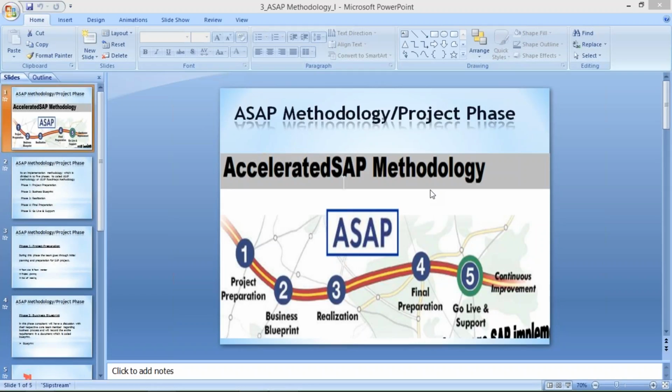So why have they segregated all these activities into different phases? Because for every phase, whoever the building engineer is is going to keep a certain deadline, that the first phase must be completed in 1 month. 1 month might mean 2 days, 4 days, ups and down, that is manageable. If they keep a certain deadline for every phase, this is how they calculate that it is going to take 2 years to construct this building. Based on all these phases, they decide the deadlines, calculate all the timings, and decide, okay, in 2 years we can hand over the ownership of these flats or buildings